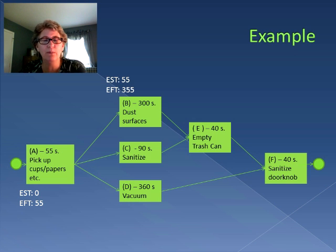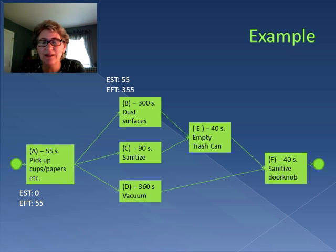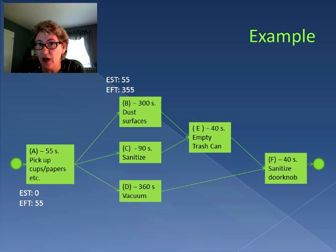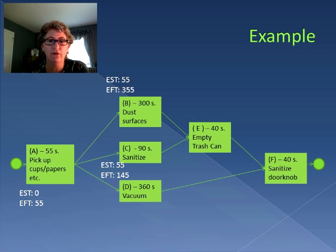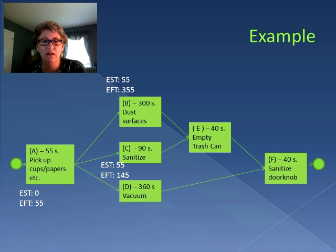Activity B has to wait until Activity A is completed, which means Activity B cannot start until Activity A finishes, so the earliest it can start is time 55. We add the 300 seconds that activity lasts, and so Activity B can finish at 355. We do the same thing with Activity C — it can start at time 55 and it finishes at 145. Activity D starts at 55 and finishes 360 seconds later at 415.